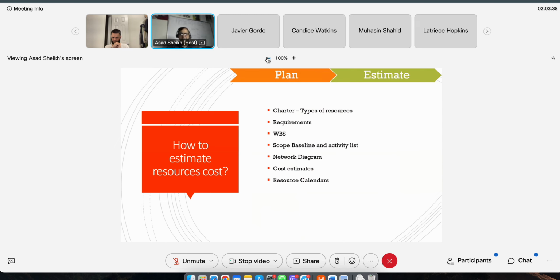Okay, so we talked about, now we have identified their planning, but one thing the PM also has to estimate is the cost. Even though we're discussing it now, remember when we were discussing it earlier, we said in the charter that we need Tom for 1 FTE, 1 full-time equivalent. At that time we didn't have the name Tom. We needed an analyst, right? So we said we need an analyst, one full-time equivalent, which means 40 hours a week. Now, that was in the charter.